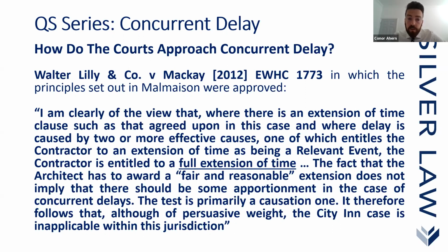The fact that the architect has to award a fair and reasonable extension does not imply that there should be some apportionment in the case of concurrent delays. The test is primarily a causation one. It therefore follows that, although of persuasive weight, the City Inn case is inapplicable within this jurisdiction."